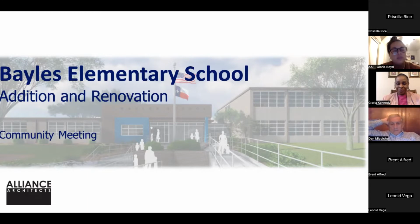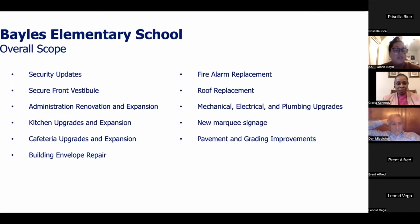So Bayles Elementary School, the project is including an addition and renovation scope of work. The overall scope of work includes the following: security updates, secure front vestibule, administration renovation and expansion, kitchen upgrades and expansion, cafeteria upgrades and expansion, building envelope repair, fire alarm replacement, roof replacement, mechanical, electrical, and plumbing upgrades, new marquee signage, and pavement and grading improvements.